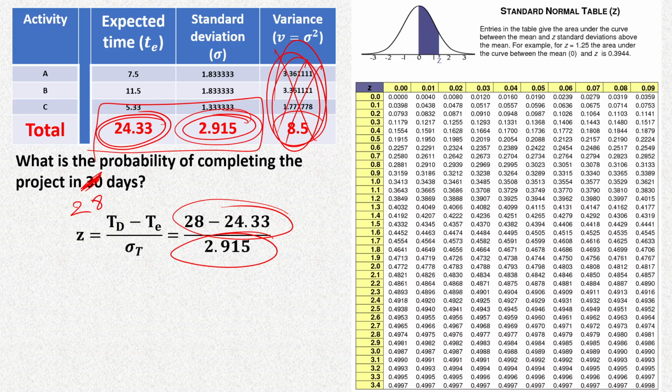So then we'll get the z value as z equal to 1.259 or 1.26 approximately. We are approximating up to the second decimal place because this table only gives us up to the second decimal place. And it is quite comfortable here also because it is 9, so we can very easily approximate it, round it off to 1.26.